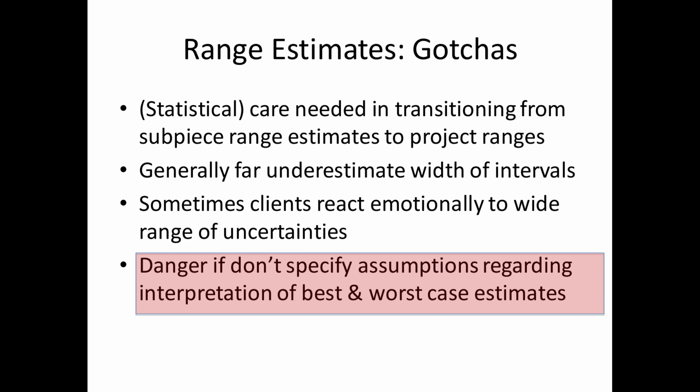Well, one way, we could have a phase 0 where we can really shrink that estimate by allowing us to do a spike prototype of this, or look into this issue, or remove this one feature that we're most uncertain about, and I'm very confident it can be done between 2 weeks and 4 weeks. Get that discussion going about where the risk is. If you don't give them the dignity of knowing your uncertainty, you can't have that discussion as readily.